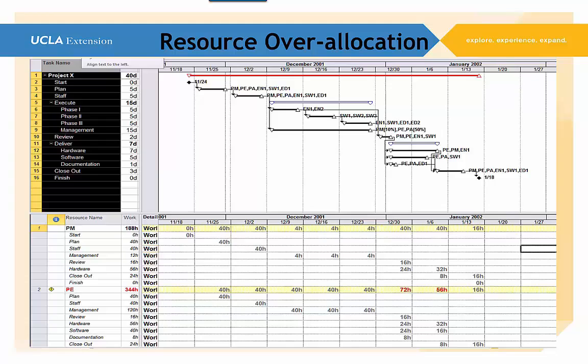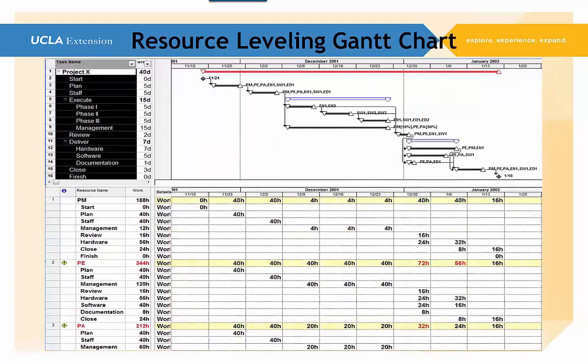And then in the following week, the project engineer is allocated 56 hours. So basically in 5 days, the schedule says that the project engineers will work 7 days. So by using these kind of charts, we can communicate a lot of information. And this is really helpful. And this is the kind of chart you use when you're going through your project to look at seeing if your resources are over allocated and how many resources you're actually using on your project team.